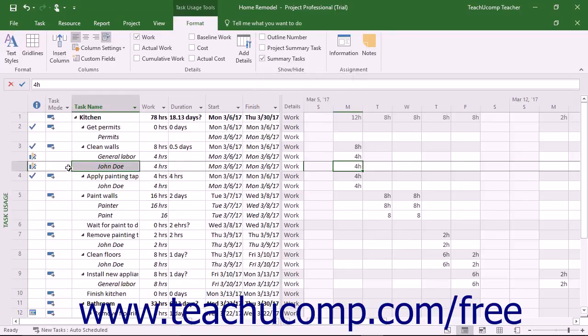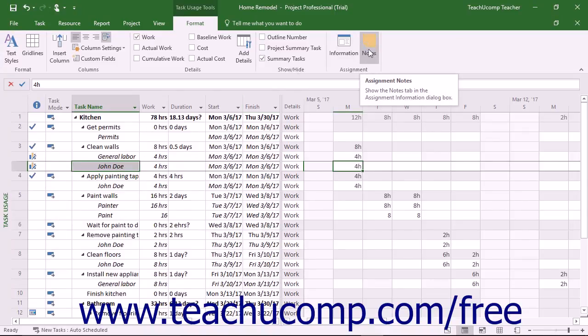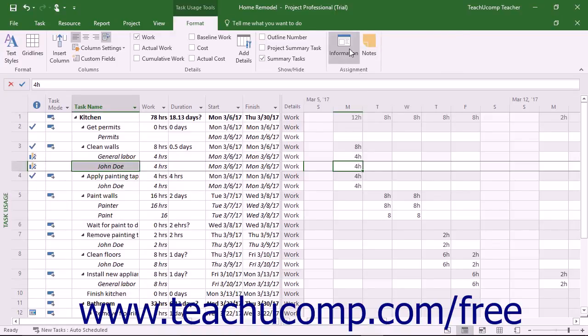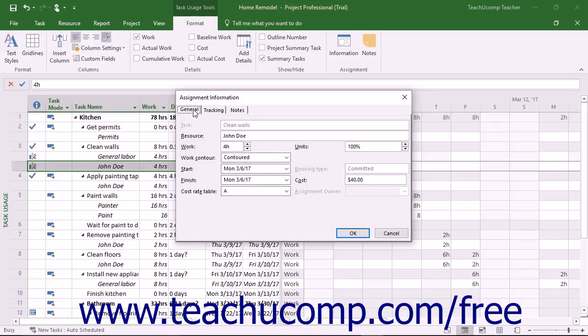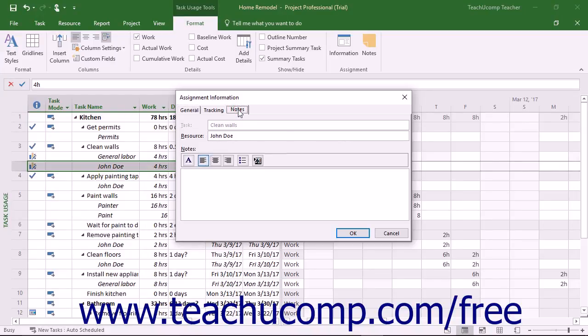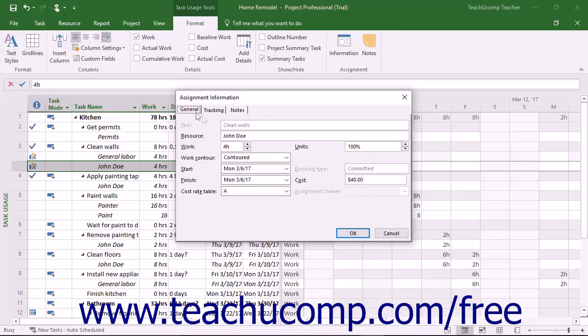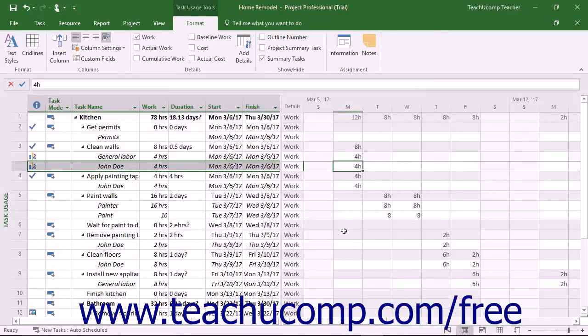If you have a Work Resource row selected in the view, you can click the Information or Notes buttons in the Assignment button group on the Format tab of the Task Usage Tools contextual tab in the ribbon to display the Assignment Information dialog box where you can edit the Resource Assignment information for the selected task if needed. Clicking the Information button displays the General tab within this dialog box, and clicking the Notes button displays the Notes tab within the dialog box. You can make any Resource Assignment changes as needed, and then click the OK button to apply them.